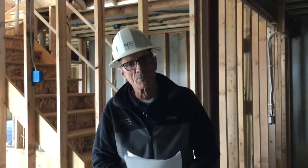Now, my current schedule is I will finish rough inspections tomorrow and Monday, and I will be moving to insulating all of the exterior and interior walls on Tuesday. Then I have all of my energy inspections on Wednesday and Thursday morning, and then Thursday afternoon we stock drywall and we move right to hanging drywall.